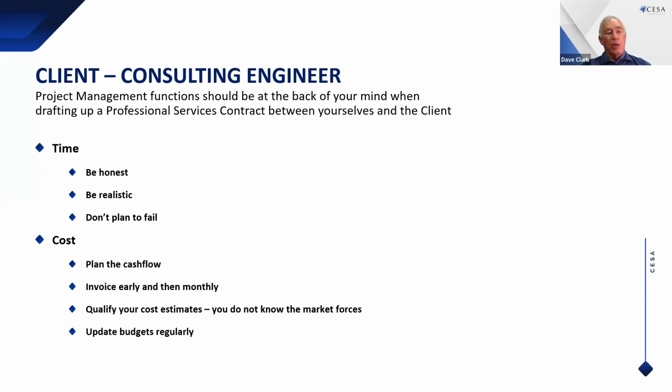Time. Be honest. Be realistic. Don't plan to fail. Often we'd say, okay, we'll do the prelim design in 3 months, the detailed design in 3 months, procurement in 1 month, 7 months, and we tell the client that. But actually, you must build in float. Otherwise, you're planning to fail. Don't go in with over-optimistic timeframes. Plan the cash flow.